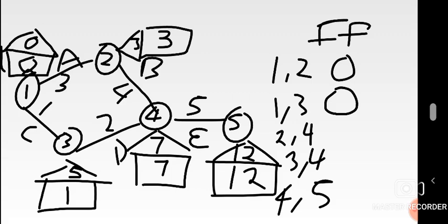If anything, 1 minus 0, you have 1. 1 minus 0, you have 1. 1 minus 1, 0. That's your free float. And you go like that. 2 to 4 is 7. 7 minus 3 is 4. That again, you get your free float of 0.